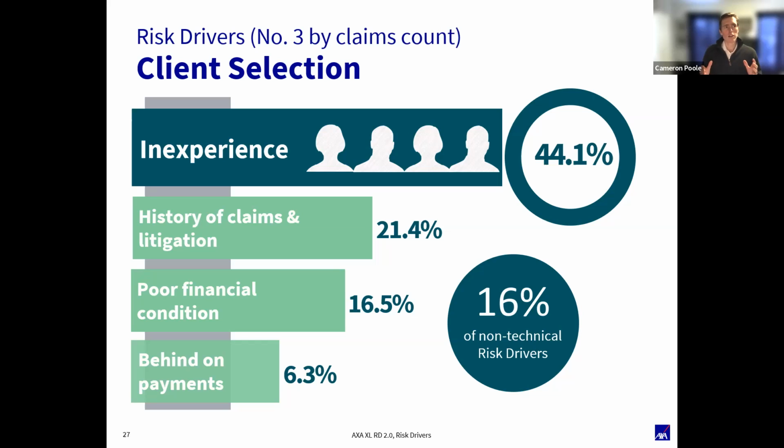And I ask that architect, did they retire? And it's, oh no, they had a difference of opinions with the owner, right? And the owner fired them. All right, well, that's not a great project probably to step in on without asking some additional questions and really vetting that owner. Far worse, sometimes we have the circumstance where an architect will say they're actually in litigation with another architect, and we're going to take this over midstream. That's one of those projects where you definitely want to say no.